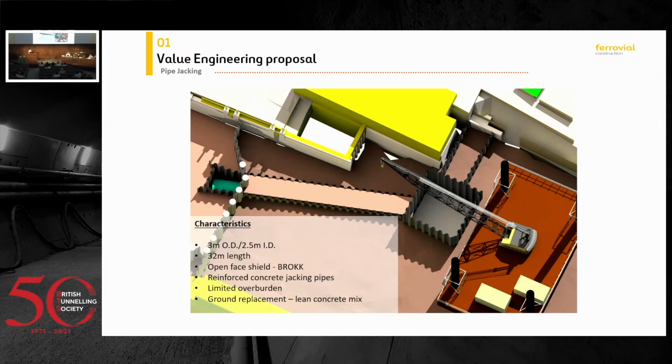How we were going to do the pipe jacking, what we thought was we need to build a launch chamber and a reception chamber, which is fine. The launch chamber was also a cofferdam, but as we could create a square section that we can prop inside, we could drive those seed piles with a super silent piling rig from Giken, which I'll show you in a second. And then the other challenge that we had was obviously all this was going to get inundated with every tide. So we had to ensure that there was no water ingress into the excavation drive.